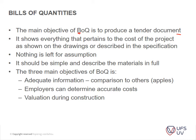It shows everything that pertains to the cost of the project as shown in the drawings and prescribed in the specifications. The easiest and shortest way to describe a bills of quantities — it's basically the drawings put into words and quantified, so that a contractor can systematically price those items. Nothing is left for assumption. For instance, if there is formwork or a chamfer at the edge of concrete beams, that has to be described in your item so the contractor knows how to price for that.